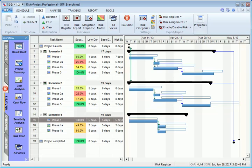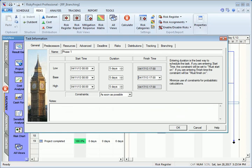To define probabilistic branching, select a task which has multiple successors. Double-click on the Task ID and go to the Branching tab.